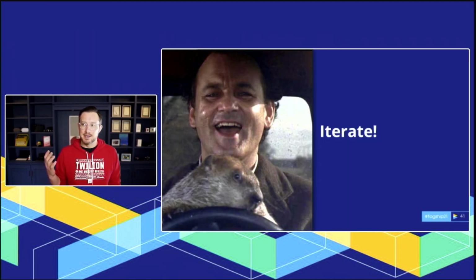And then most importantly, make sure you've built tools, a platform, and a team that can iterate quickly. You're going to get feedback that you need to make changes right now, or you need to inject things into the next sprint. Make sure you're leaving room inside of your sprint to inject critical bugs, or that you can reprioritize different epics. And these are all expectations that you set with the team, that you set with other stakeholders inside of the company, but you need to be prepared to iterate.